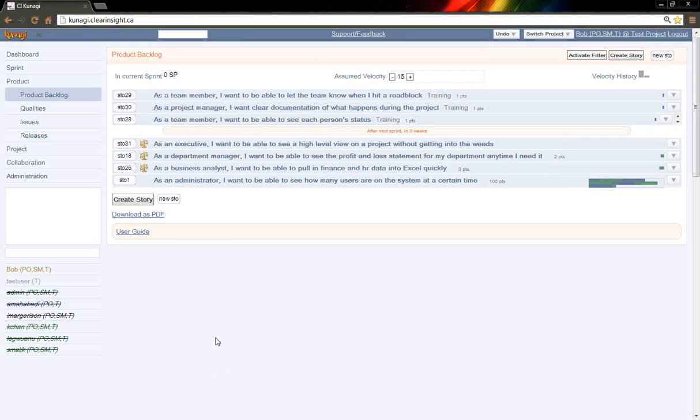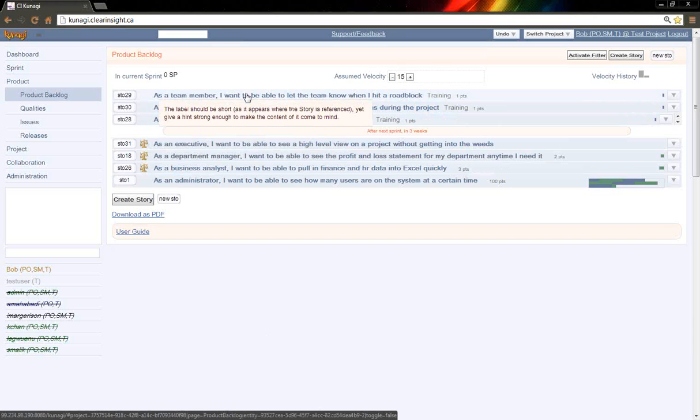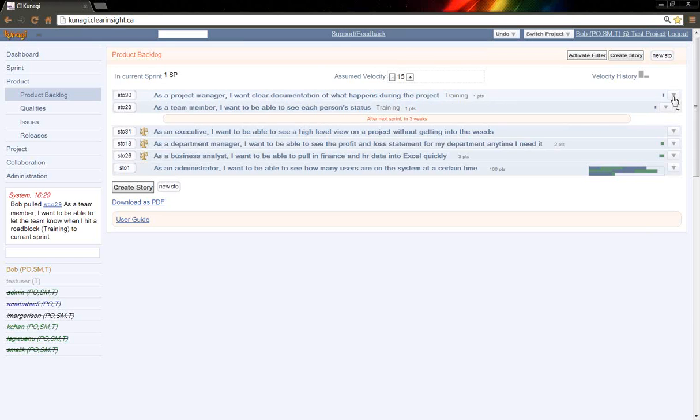When we get together for our sprint planning, we decide what we want to take on. So the product owner has already moved these things around, and the ones near the top, they should be able to say, I think those are the ones I want to get done. So the product owner comes and says, I'd really like it if we can get these 3 things done in the next sprint. Team, what do you think? Think we can do that? And the team gets a chance to ask questions, clarify different things, put in more detail, maybe split them out, refine them, reword them. But at the end of it, we end up with a couple that have been accepted. So we really pull them into a sprint.